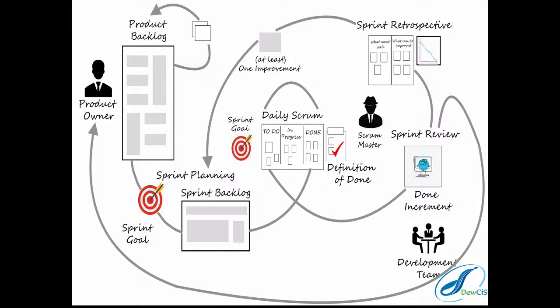Then you'd think of the items that you need to pick. For example, the fastest thing may be to create a social media page. So if that is the fastest and you think is the one that can give you the nearest impact, it means then the task you put on a sprint backlog would be, as the business owner, I want to create a Facebook page so that I can be able to advertise my products and start to get customers interested in me, following me.